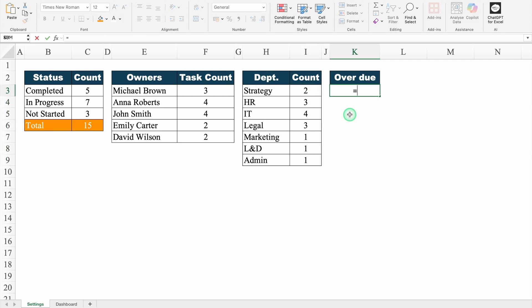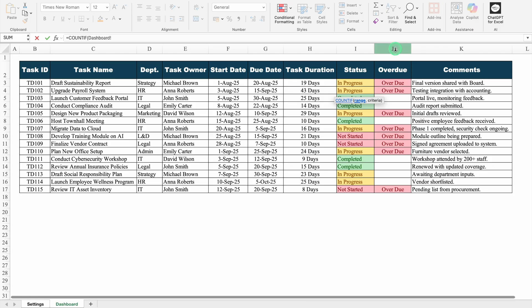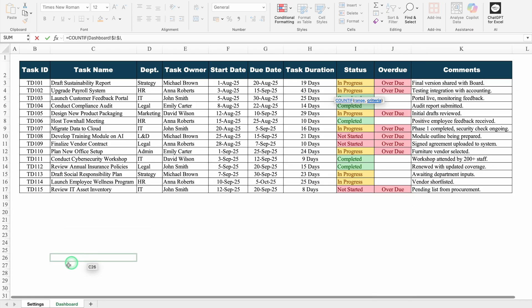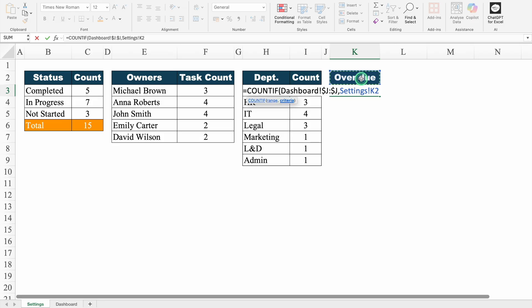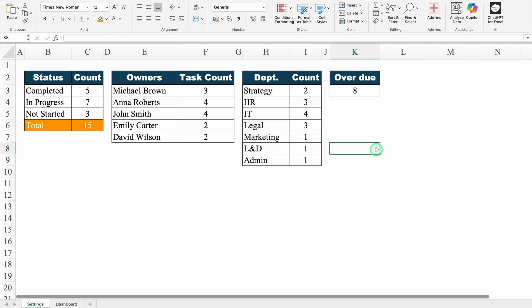For Overdue, equal to COUNTIF, bracket open, Range: go to dashboard and select the Overdue column from top, press F4 to lock the range, comma, Criteria: go to Settings sheet and click on overdue. Close bracket and hit enter. We got total overdue as 8. All the formulas got inserted in the Settings sheet. Let's go back to dashboard.